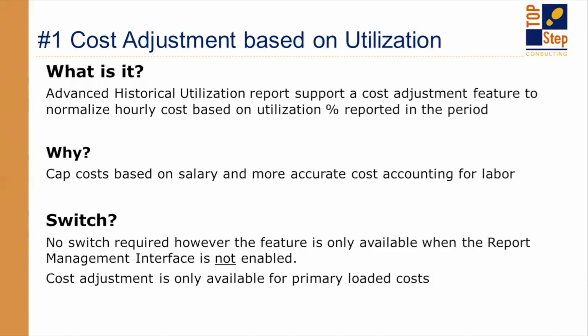So that utilization value says, how much did you work of a normal work week? So if I worked 150% of a normal work week, it's going to use 150% and realize, okay, I went over 50% than what I should. So it's going to use that percentage to reduce my hourly cost and put an entry in my cost table. Okay. So here's how it works.